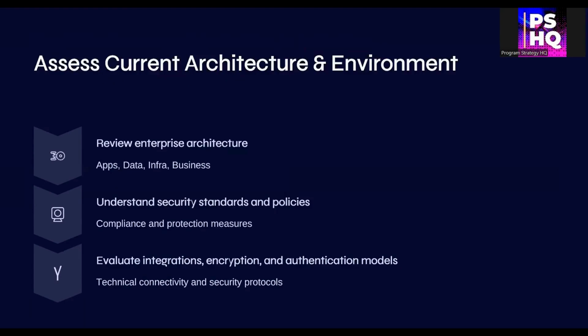Before you implement anything, understand what's already in place. Review the enterprise architecture, the business process, data models, infrastructure, and applications. Assess security standards, encryption methods, and authentication protocols. The goal is to know what you're integrating with and what could break.